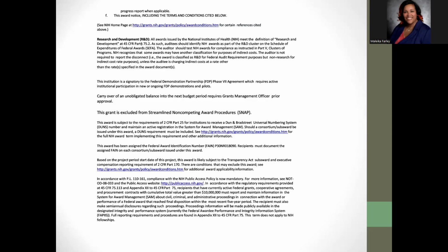One thing that we've recently learned, I mean, I think maybe we knew, but didn't see it in practice, is that the NIH funds expire after 5 fiscal years. So if you have an award where you were given funds 5 years ago, let's say it was awarded in September of 2021, and then we roll around into October of 2026, which is when NIH's new fiscal year starts, those funds from 2021 expire, they're gone.